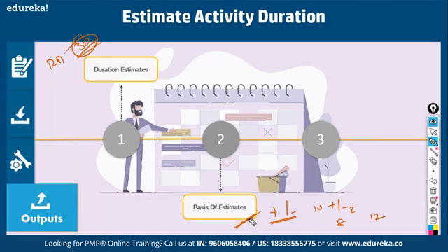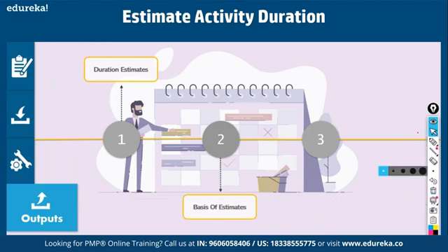It is not enough if you come with an estimate. You must also say on what basis you came with this estimate. Okay. Then what else? Project documents will get updated in this process.